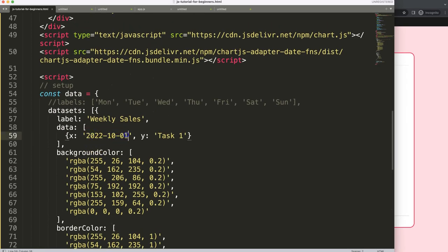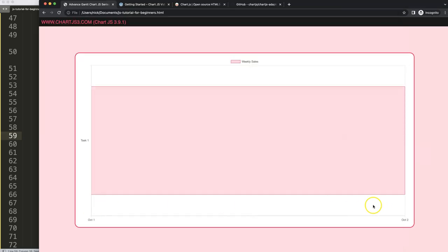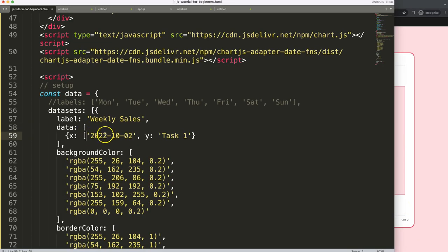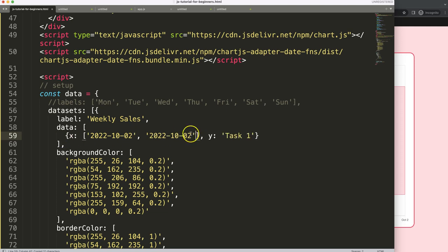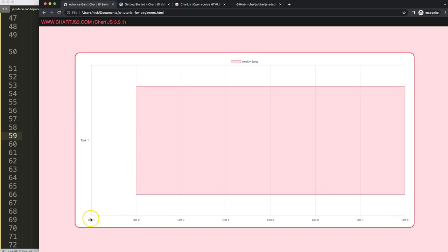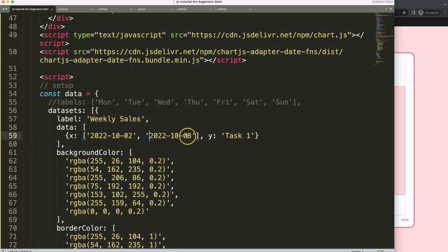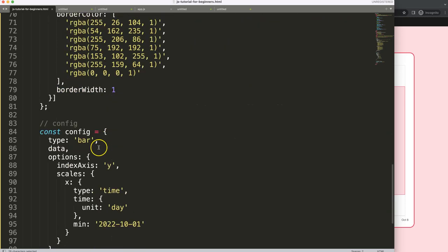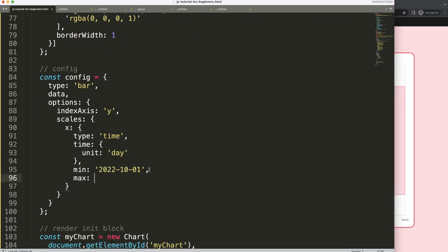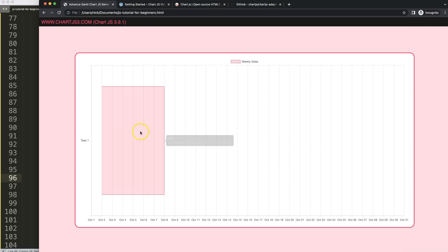Now we want to create a real Gantt chart by giving each data point a start and end date. For example, add a second date value like October 8th as the ending. Now we have a starting and ending date. I'll also set a max value of '2022-10-31' for end of month — save, refresh — so now we have a nice Gantt chart.